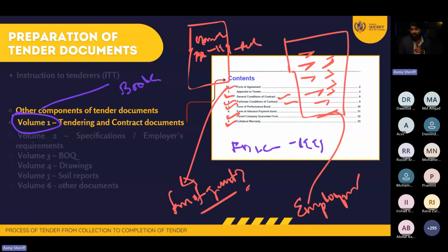So remember, guys, both parties should have a small agreement signed by both parties, where they are going to say that we, as Muhammad and you as John, are signing a contract to execute the construction of ABC building. And for this building, I'm going to pay you 200 million. And you are confirming that you will execute and complete the work in accordance with the attached drawings, specification and ABC documents. And we both are agreeing to these terms and conditions, and both of them will sign.